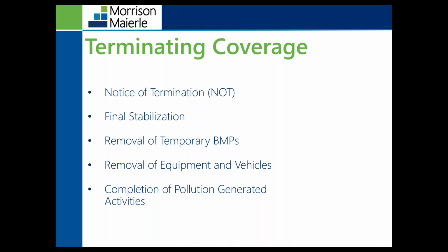DEQ, as part of this permit, has an annual fee associated with it. If you have an active permit at the start of the year, you'll have to pay that annual fee. So if you meet the requirements for terminating your coverage, make sure you submit it as soon as possible, so you're not seeing that annual fee associated with the permit.